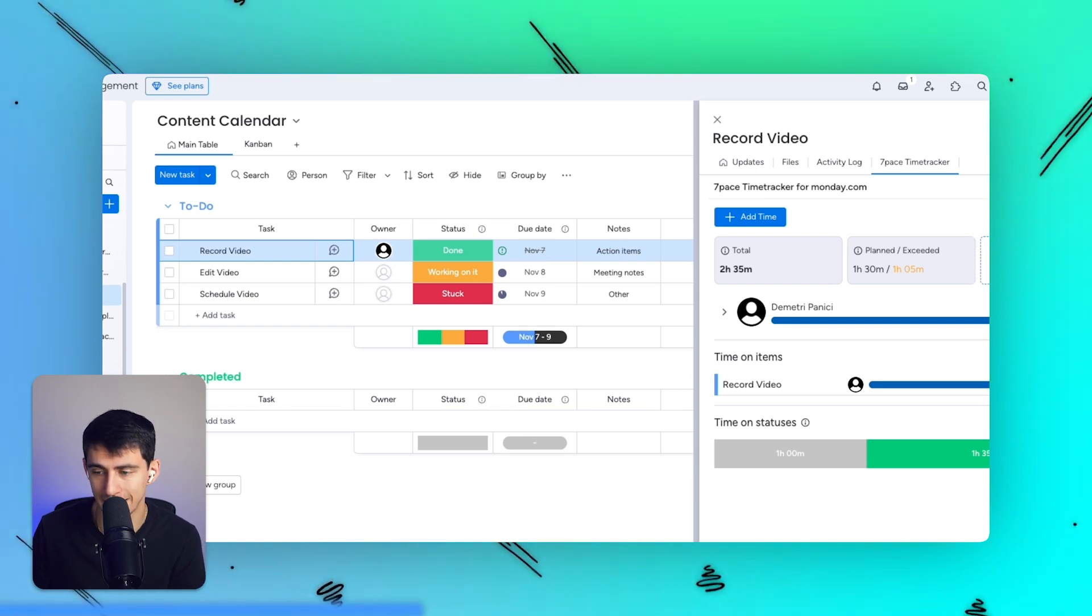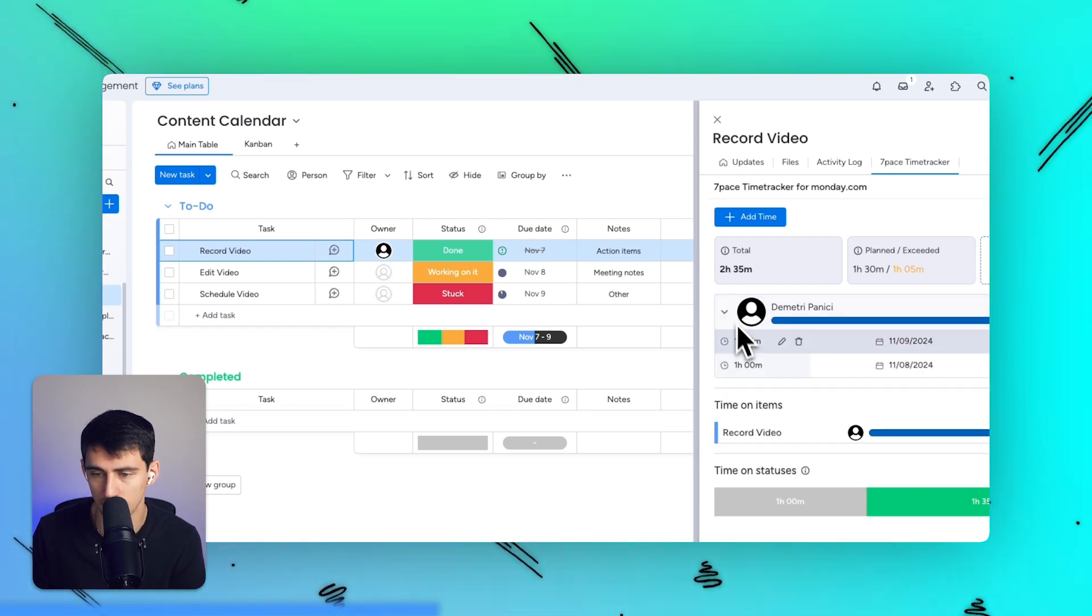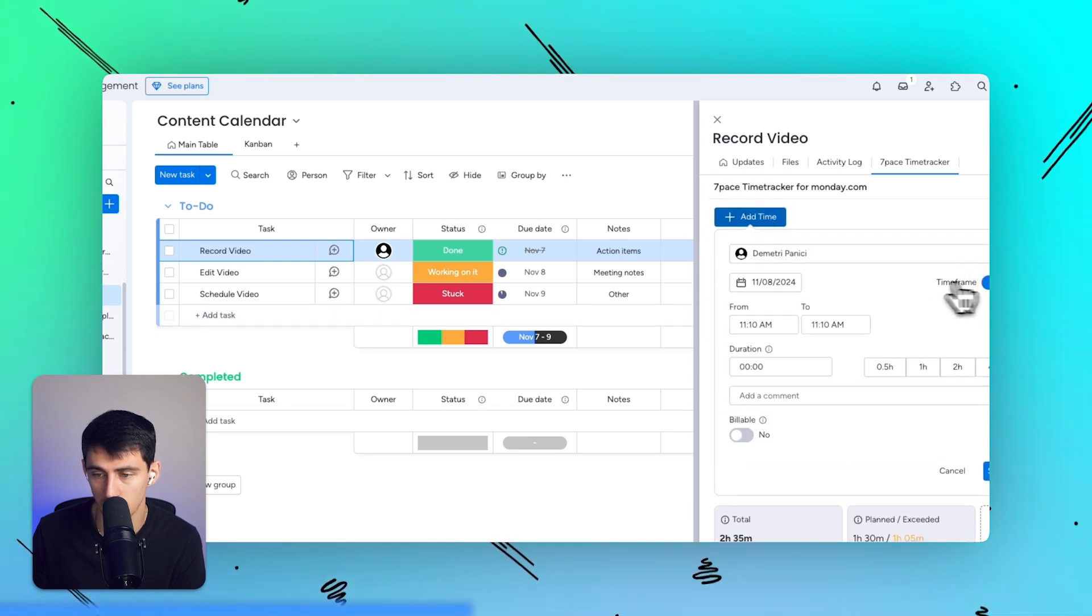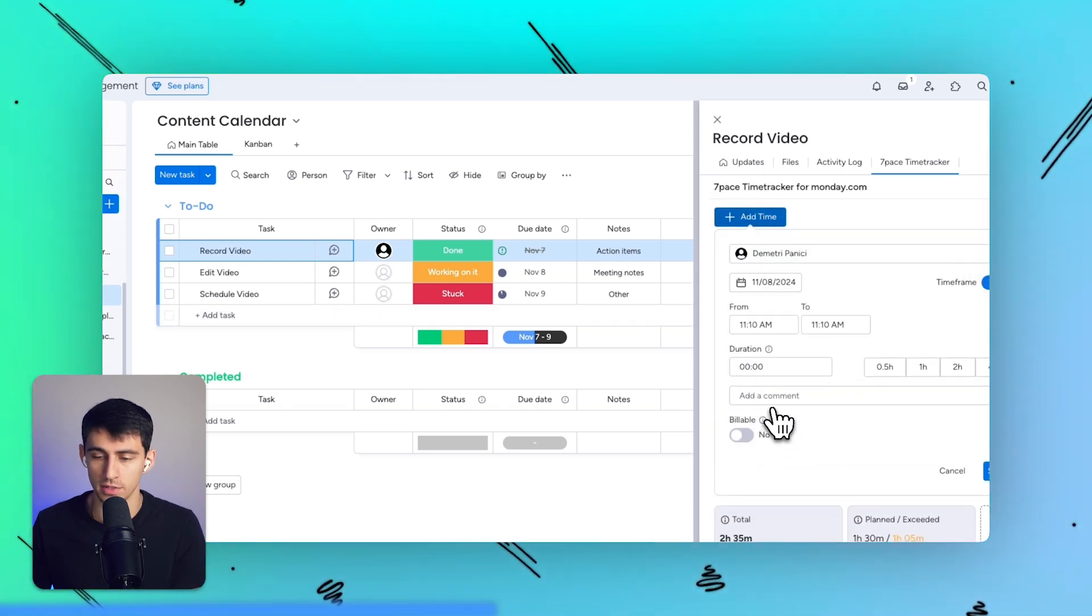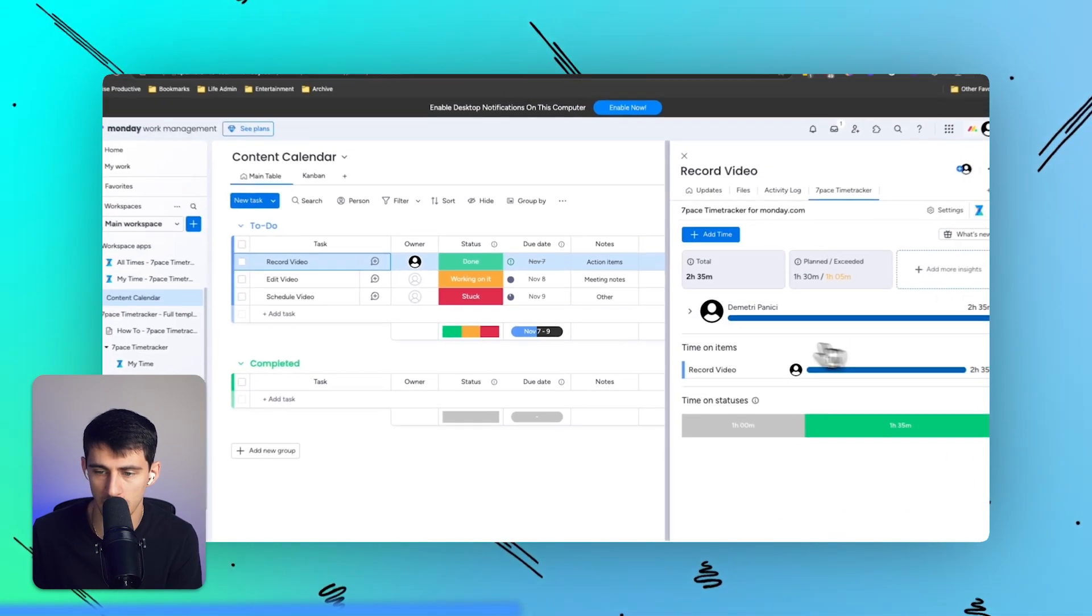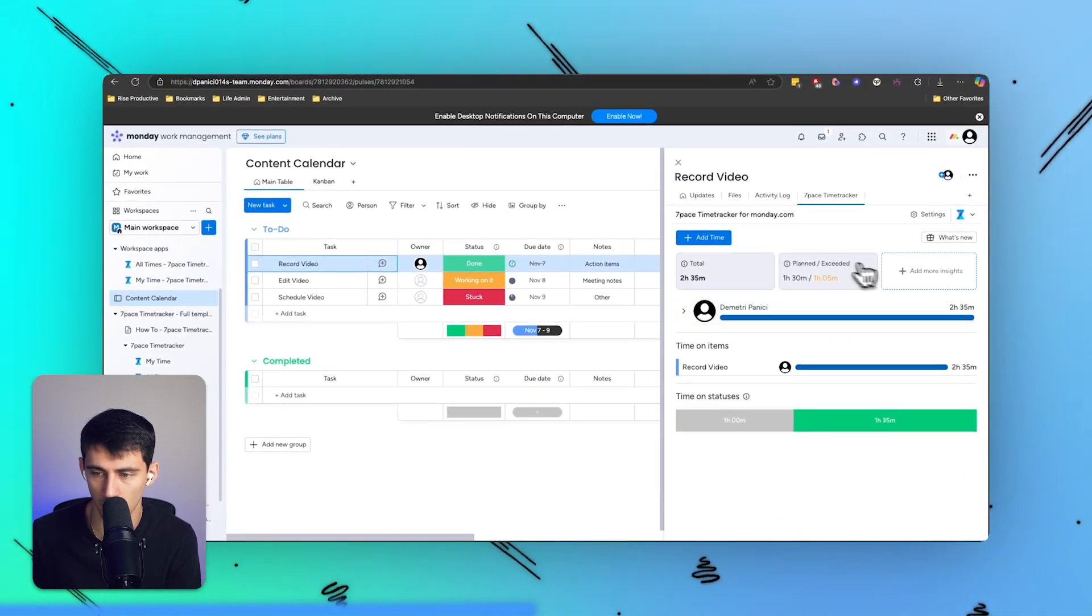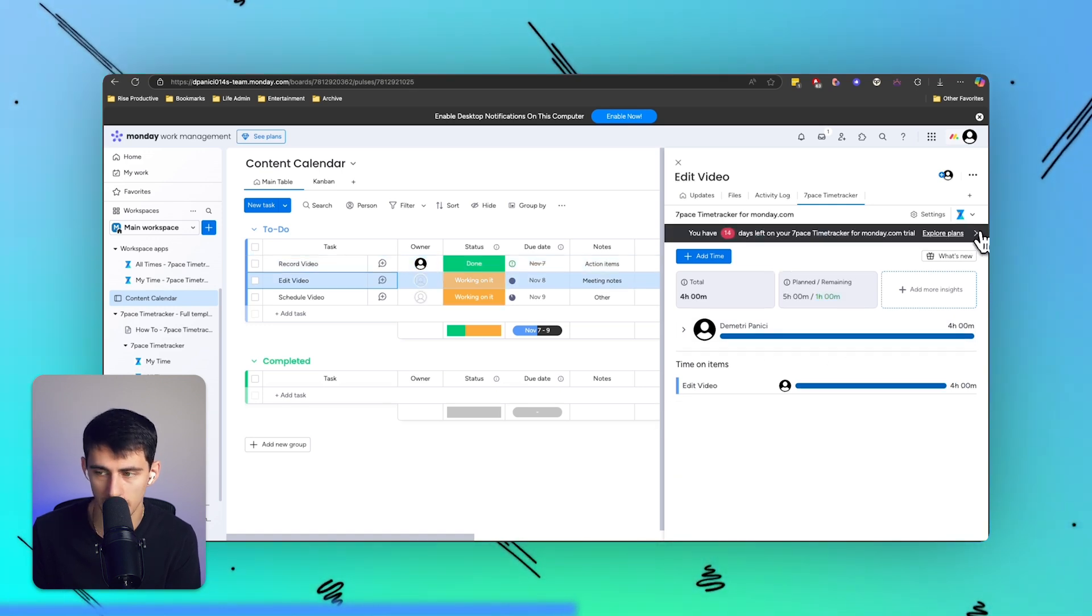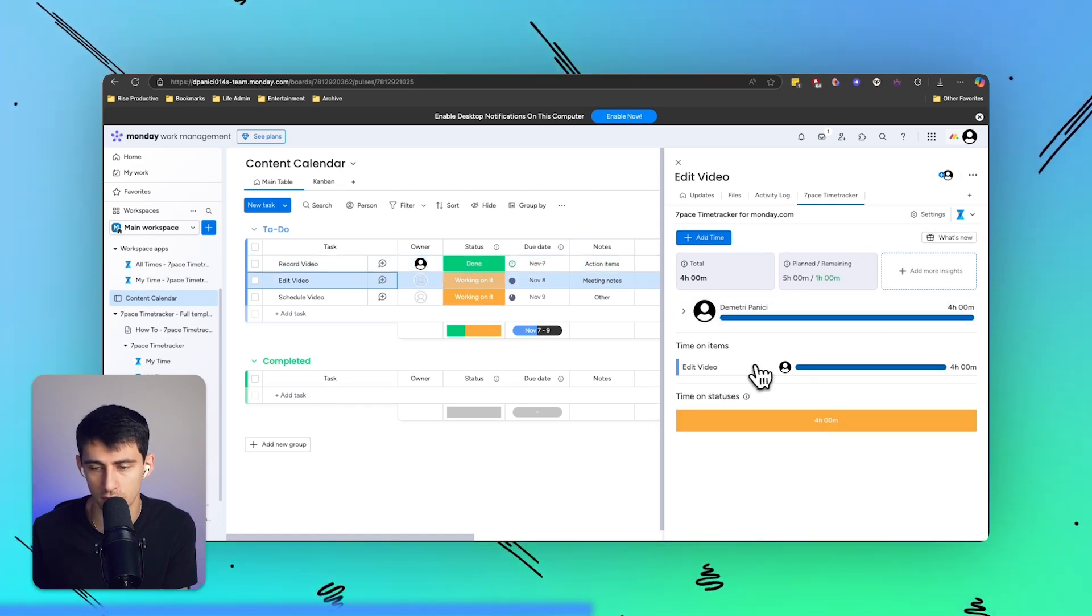I can add any logs to time by person and at whatever time or date I would like, along with comments and referencing whether it's billable or not. As you can see inside of this, I have tracked two and a half hours for what I thought would take one and a half hours, so I have overdone how long it would take on this recording.